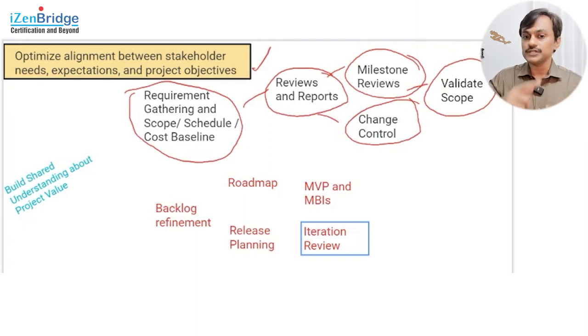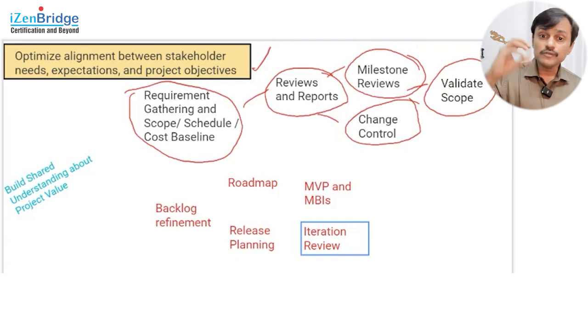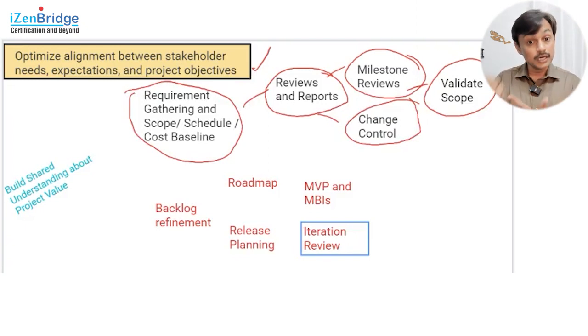Continuous prioritization, release plan updates, and roadmap updates are shared with these stakeholders. Whenever we put the product in the market, either MVP or MBIs, we need to ensure that we learn from them, we share with the stakeholders, and those stakeholders are aligning, because the feedback loop is small. In the adaptive life cycle, the key to alignment is continuous discussion and quick feedback.